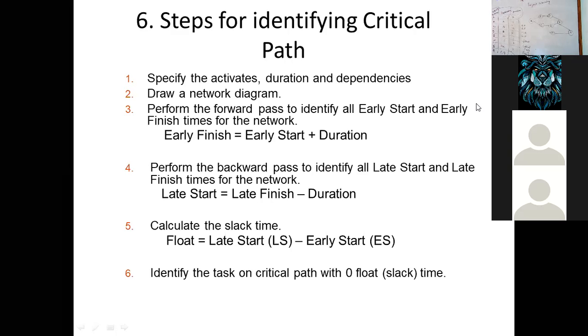What we need to calculate is the critical path, which is the longest path and has the least float and maximum duration to complete the project. We need not calculate the shortest path; we need to calculate the longest possible path, because we assume that the project can take at most this much time and should not take more than that.